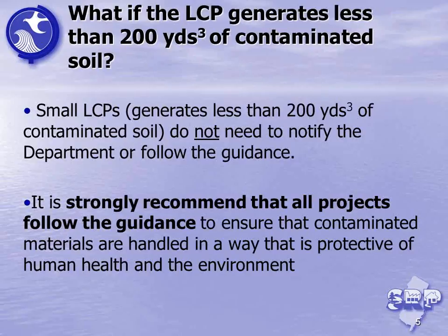So projects that generate less than 200 cubic yards are not considered a linear construction project. They don't have to give the department notice. They are not required to hire an LSRP. They're not required to submit a final report. However, we strongly recommend that they follow the concepts and other department guidance and rules about handling contaminated material. That's necessary to protect public health and the environment.